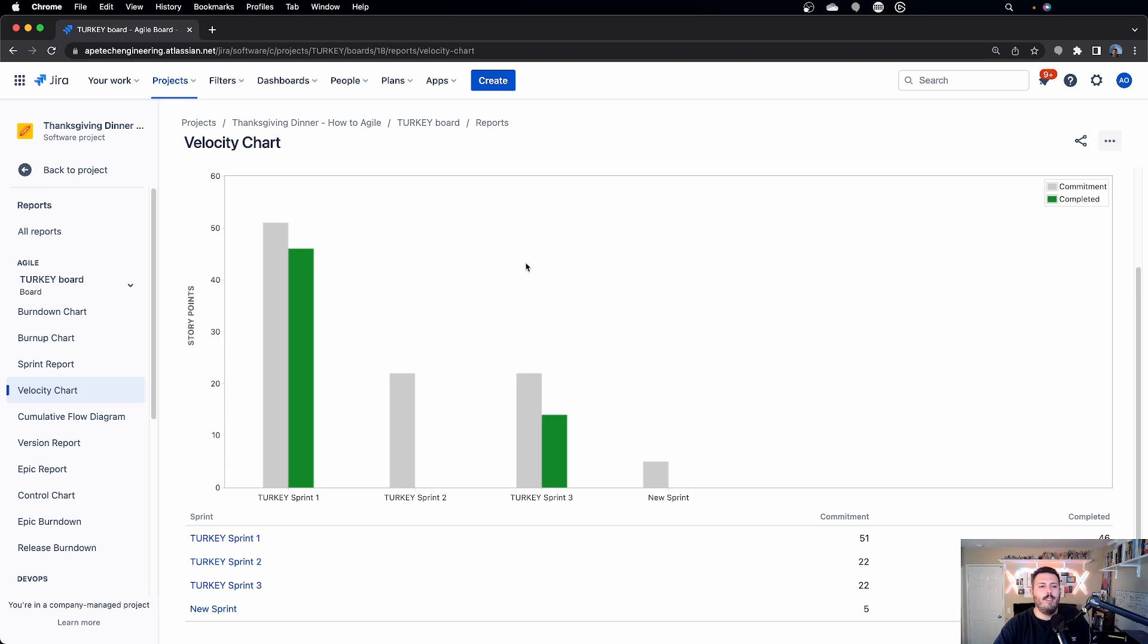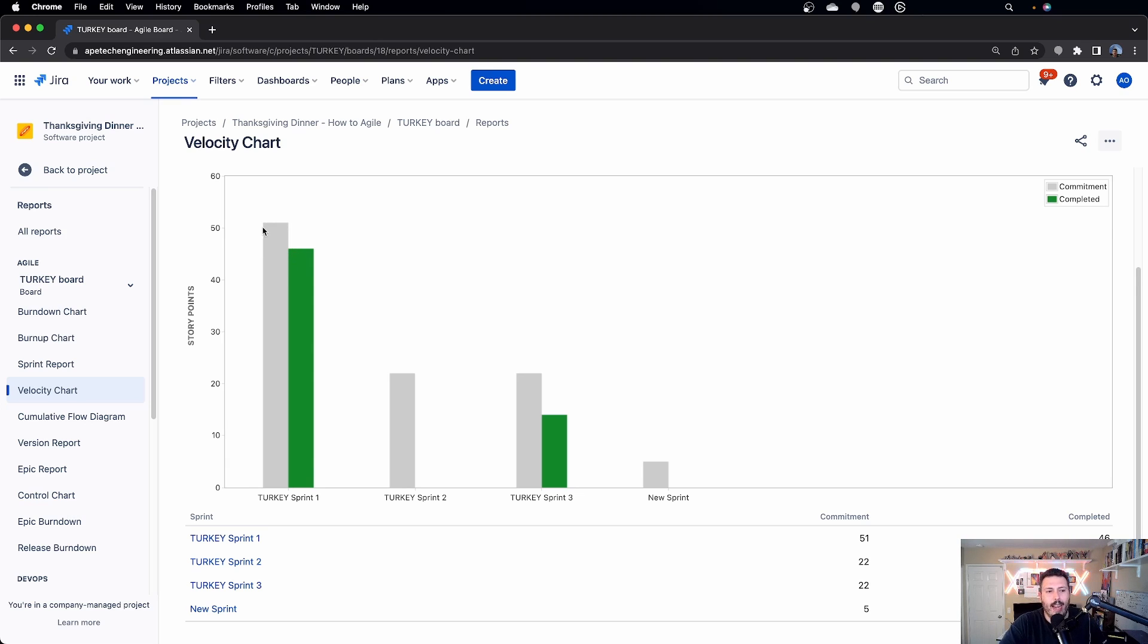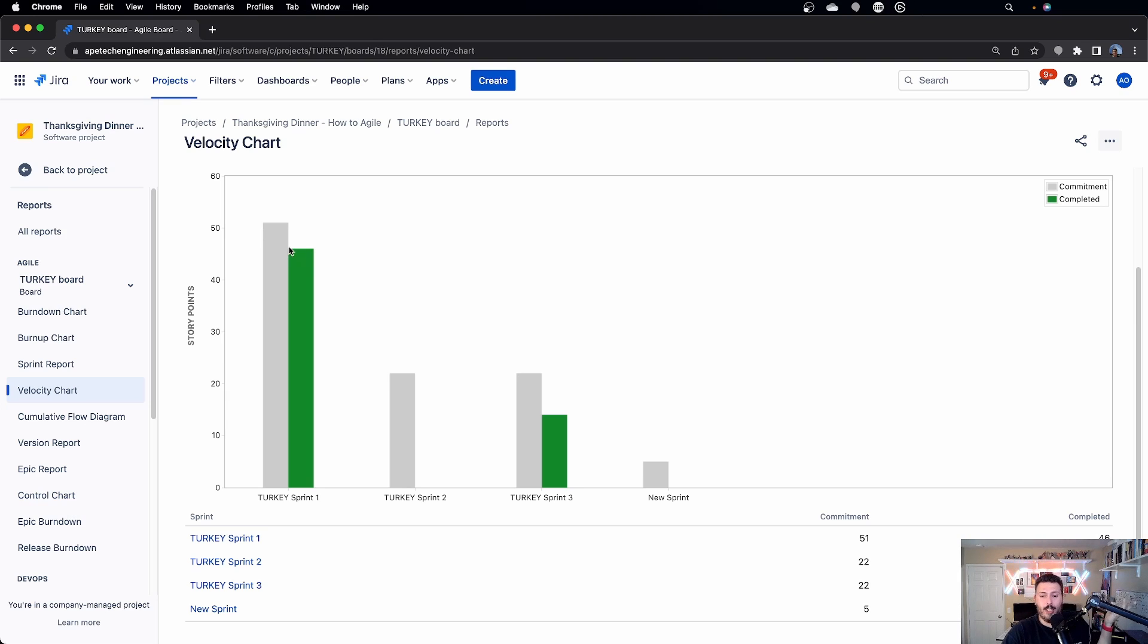So if you see here, like the story that's being told here is essentially, hey, I hit 50 my first sprint. We finished 46. Great. This is really good. But for some reason, we only planned 22 points for the next sprint. Like that's a flag.